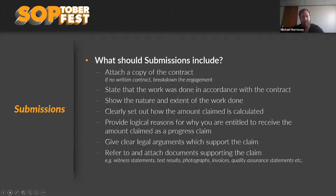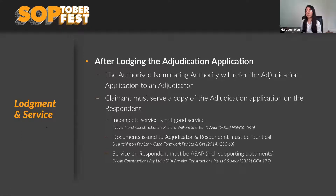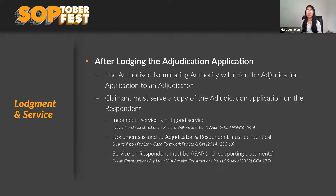Moving on to lodgement and service. If you lodge an adjudication application, it goes to an authorized nominating authority — we use Adjudicate Today. They refer the application to an adjudicator, and the claimant must serve a copy of the application on the respondent. With Adjudicate Today there is a lockbox system — you upload it online. Importantly, always look at your contract, as it will stipulate who actually receives service.